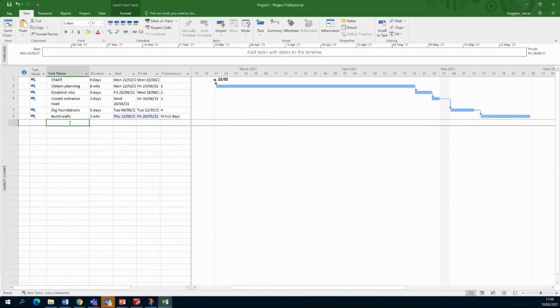As well as that, I could be doing some landscaping, for example. Okay, because the track machine is still there on site. So rather than the track machine heading off and not being kept busy, we might as well keep him busy while he's there, because it costs money to get machinery on site and to leave it off and to get it off site again. Also, it's hard to get them back sometimes. So we get him landscaping.